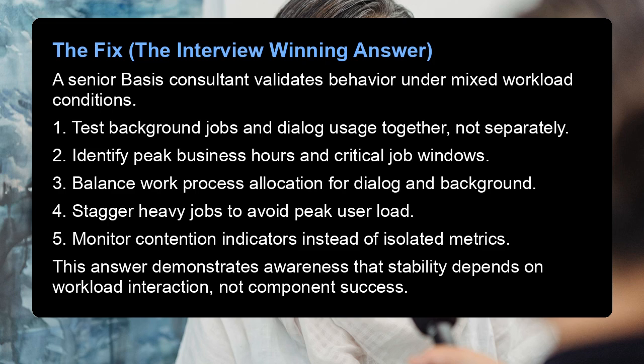The fix, the interview-winning answer. A senior Basis consultant validates behavior under mixed workload conditions. 1. Test background jobs and dialog usage together, not separately. 2. Identify peak business hours and critical job windows. 3. Balance work process allocation for dialog and background. 4. Stagger heavy jobs to avoid peak user load. 5. Monitor contention indicators instead of isolated metrics. This answer demonstrates awareness that stability depends on workload interaction, not component success.